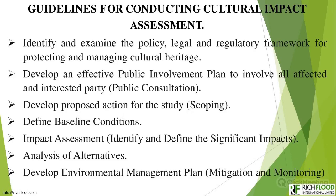This also involves designing alternative methods and approaches for protection and mitigation. Alternatives should be ranked according to effectiveness, costs, difficulty, length of time required for implementation, and monitoring needs. Decisions should be made by weighing these rankings against the cultural significance and economic value of such sites, because one has to be realistic in enforcing all this.